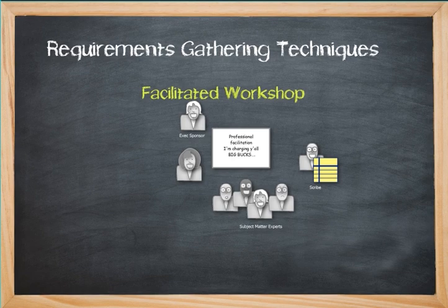And then you have silent observers, and these folks are basically making sure throughout the entire process that there's enough of the right interaction taking place. You can have a high degree of success. It can be relatively fast, and you do develop project ownership. You can get more feedback than other techniques as long as it's properly facilitated. The con could be extremely costly. But if the idea is to get the requirements done right, and you have the budget, and you know of an expert facilitator, this may be the way to go.